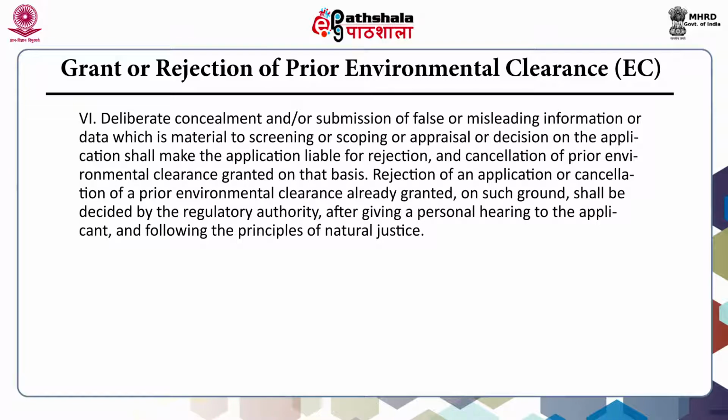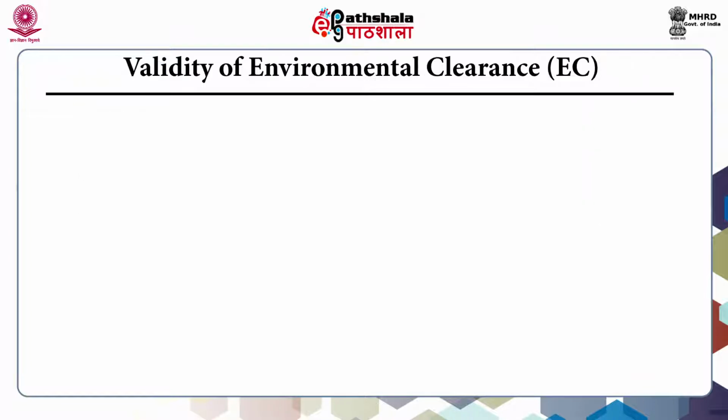Rejection of an application or cancellation of a prior environmental clearance already granted on such ground shall be decided by the regulatory authority after giving a personal hearing to the applicant and following the principles of natural justice.